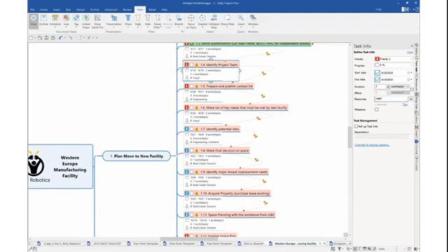If I actually add a second resource, let's see. I'm going to pick something that already exists here, like the architect. So now we have 2 resources on this task I've selected. It's 2 days duration, but because we have 2 people on it, and they're each going to work 2 days, the effort now changed to 4 days.